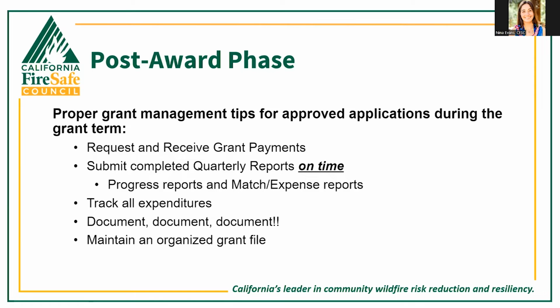And as mentioned, the second key goal of the post-award phase is proper grant management, which is just as important as implementing the project. So throughout the post-award phase, you will request incremental grant payments from CFFC. You will need to identify the work plan activities that you will pay for with the funds. Requests can be made often and should be for an amount that can be spent immediately upon receipt of funds from CFFC.